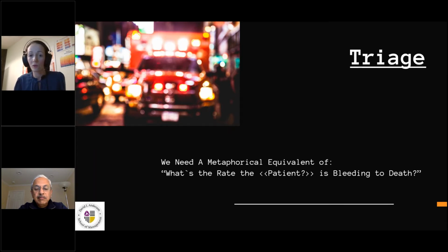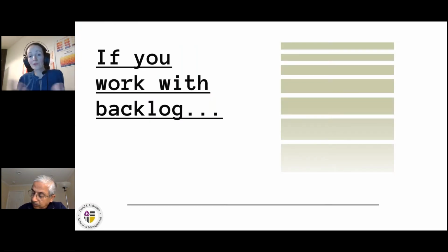Is it super urgent? So if we take care of it immediately, if we expedite this item, it will survive. Or maybe this item is not urgent and actually we can shelve it for a moment and come back to it later. Or maybe this request is beyond any help, so we should just discard it. And this is how you combine triage with real options. But in triage, the question is about the urgency. Not necessarily about uncertainty, but about the urgency. And what to do, how to start, actually.